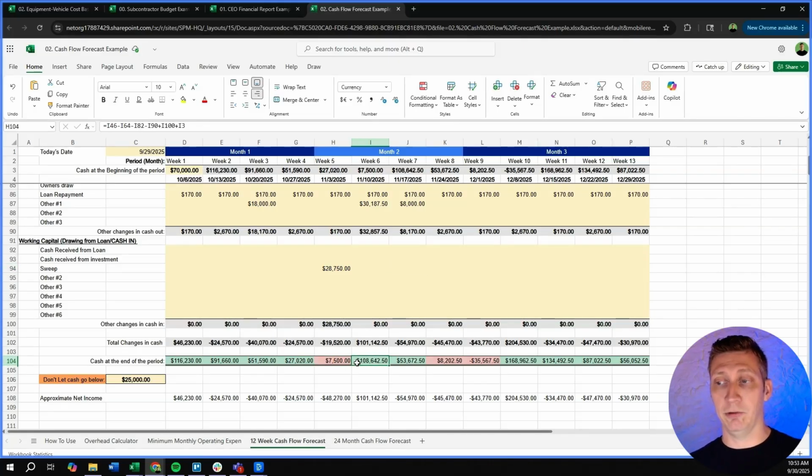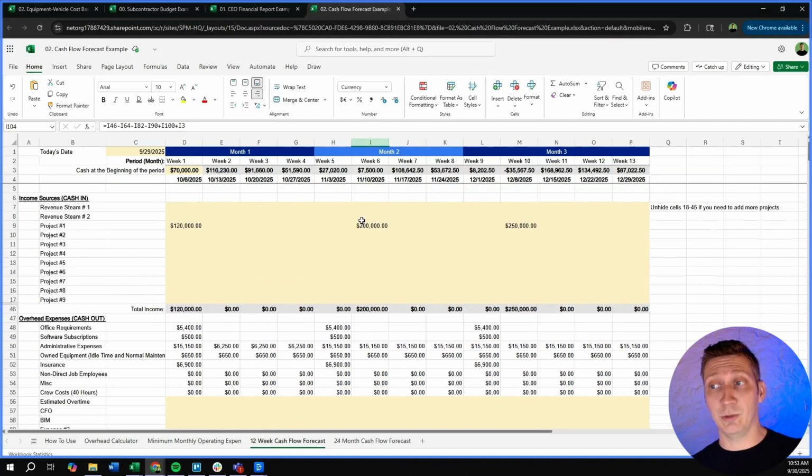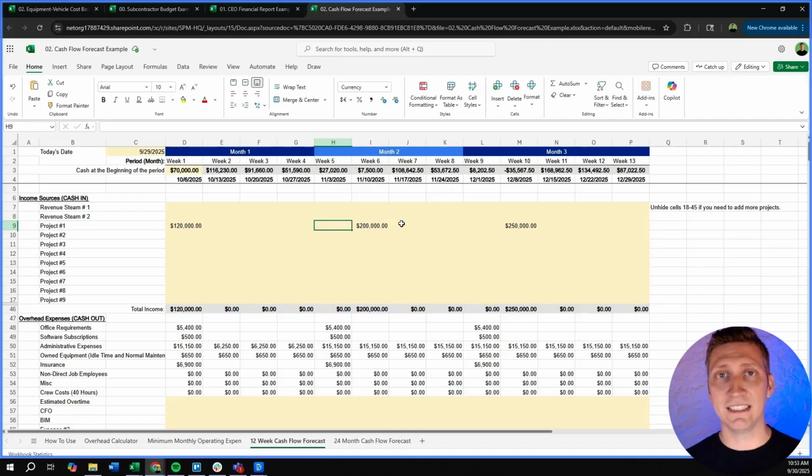And what I like to really hone in here is when we look at this, we see we're supposed to collect. We were going to be negative. We took out our sweep. We're supposed to collect. If the owner paid this the week before like they're supposed to per contract, then I don't have an issue. But if they pay the week after, I have an issue, that's my problem. And if they even delay another week, because let's be honest, general contractors don't care. Nobody cares if you get paid or not. They go on vacation. They say, oh, it's wrapped up, and the project manager hasn't accepted it, whatever it might be. So if I move that over, now I have another one. So this is just a red flag that tells me I need to send a notice of non-payment.